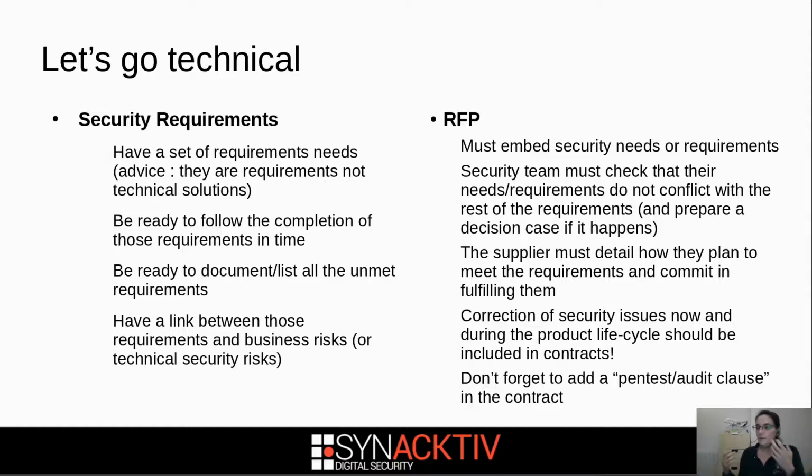So if your company chooses so, and most of the time they do, they're going to actually subcontract the development, sometimes the full integration, the full realization, to an external company. Okay, so you're going to have what we call a request for proposal. If it's internal, sometimes they're just going to ask internally who knows how to develop this part, and the process will be quite the same. So when you do an RFP or a contract, this RFP must embed your security needs.